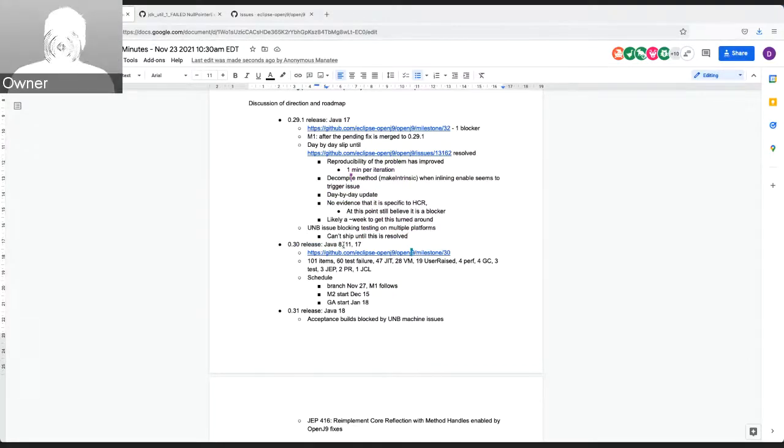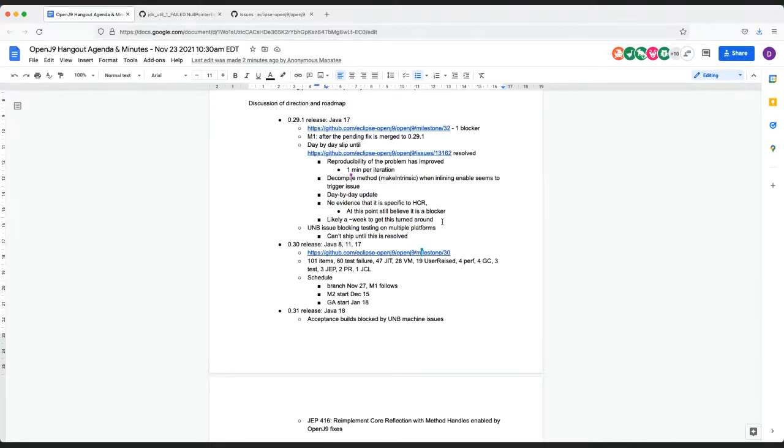So to get back to the original question, we're talking about releasing the workaround, not the actual fix, right? Yeah, I think for JDK 17, just given the potential risk of the change, we would introduce a workaround at this point. And that workaround could go into the headstream? The workaround can go into headstream as well. Yeah. So I think it would be good to wait a week with that change in the headstream and make sure that nothing pops up. Yeah, we can do that.